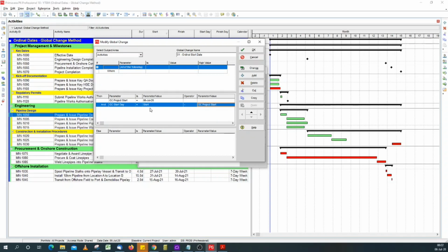Now, for the effective date or the start milestone, the first milestone, which is 6th of July, if you do 6th of July minus 6th of July, it will give you 0. Like previously explained, we want the first day of our project to be day 1, not day 0. So we need to add a +1. That means another line of formula.